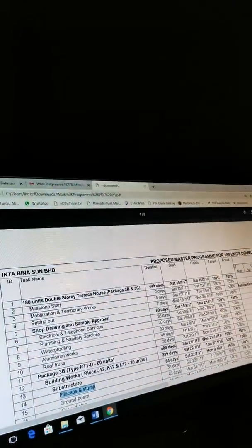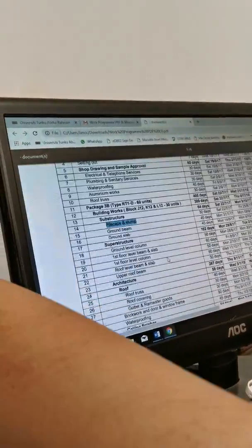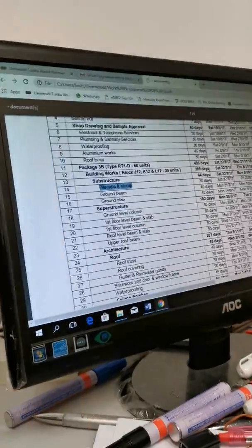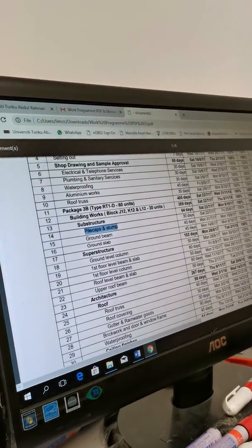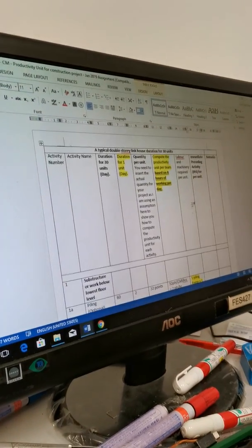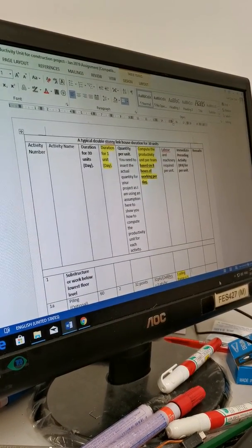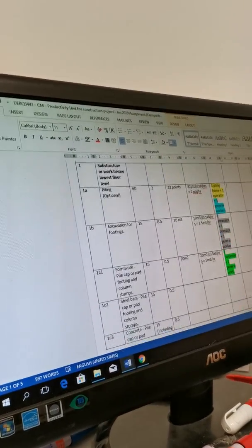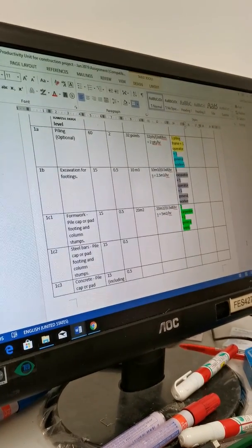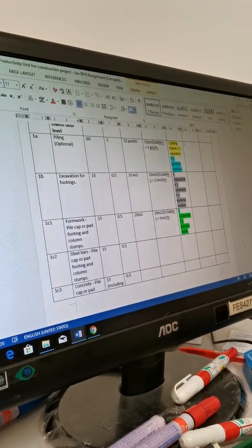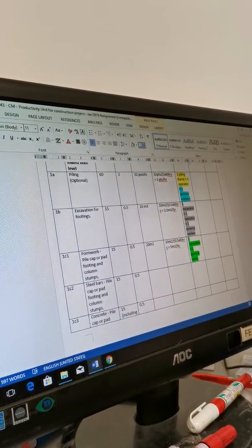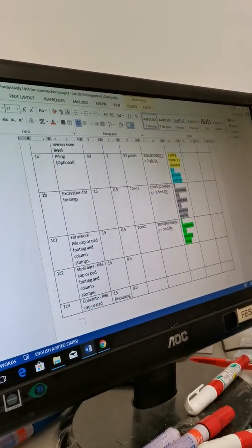So these are the controls. These are the control quantity. See? They don't use quantity directly. Actually, how to get this is at the back there. There's a quantity one, so that's how they get all these figures. So I'm telling you the steps to get it done. When you get it done, then you work reversely to the ultimate product. Once you do your AON, then you go back and transfer to your labor and machine resource requirement. So once the AON is done, your assignment on question 2 is done already, until the productivity and resource requirement for 1 unit.